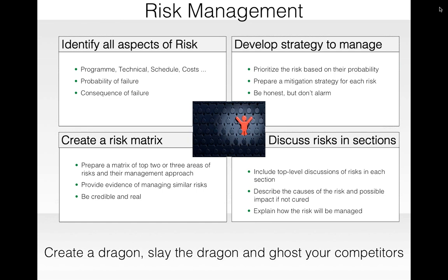Like suppose you are dependent on an incumbent vendor for transitioning, and you are sure that the incumbent vendor will not be cooperative to the fullest extent, and your entire transitioning may get delayed or may require additional efforts.